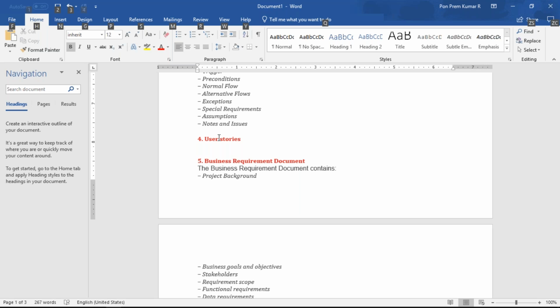It depends upon the resource size. For example, in the case you have given, 10 different teams, 50 user stories, and 5 business analysts. Every BA will be assigned some top modules. One will be assigned transaction related things, another the backend, another the front end. They work in parallel, weekly.